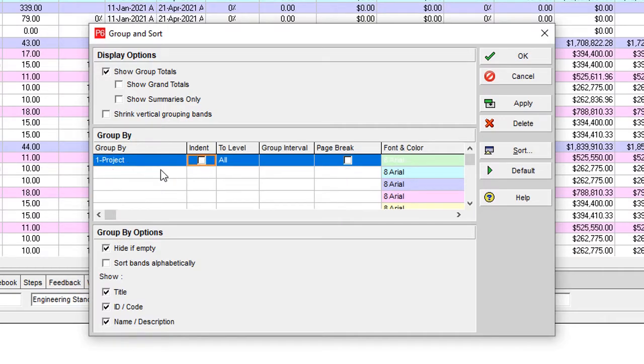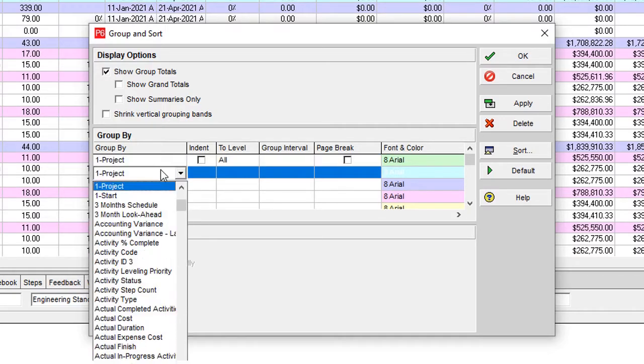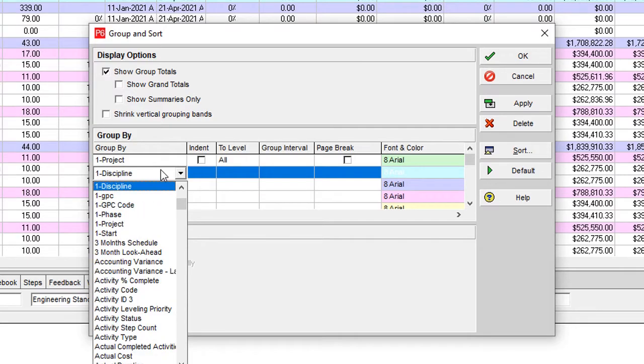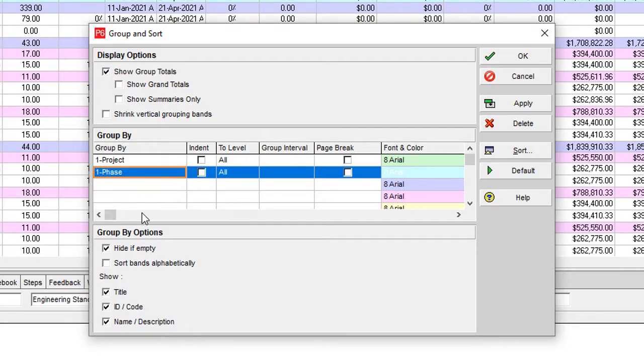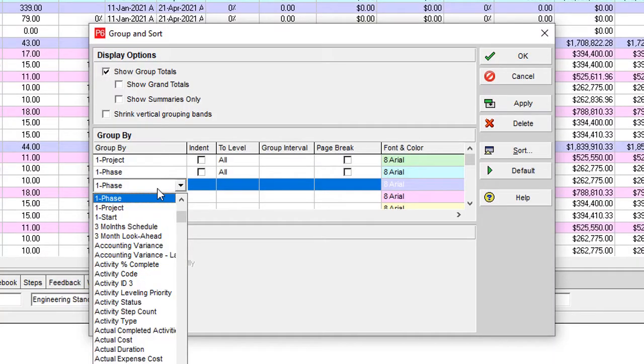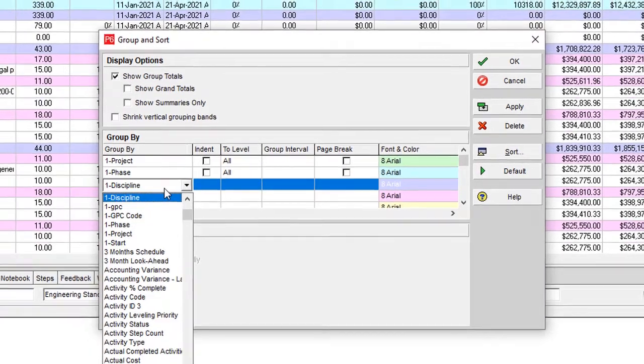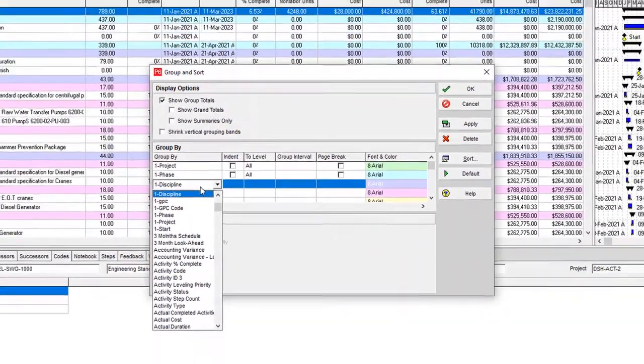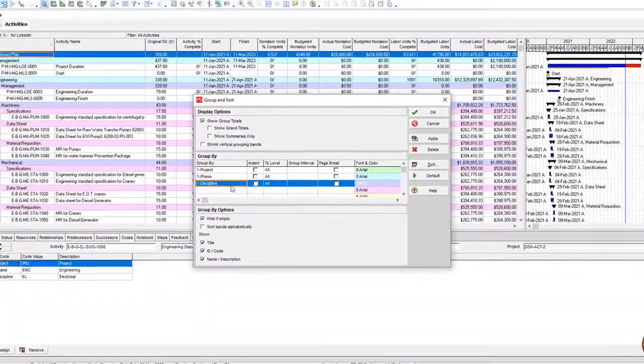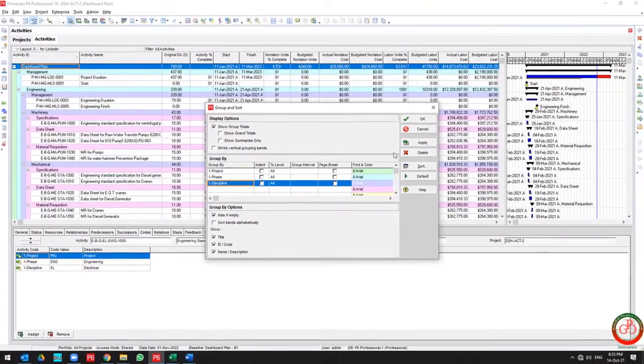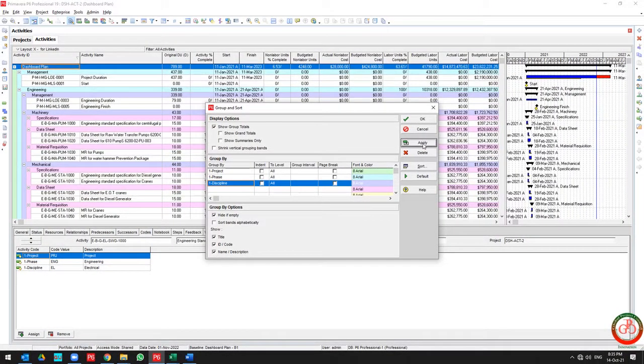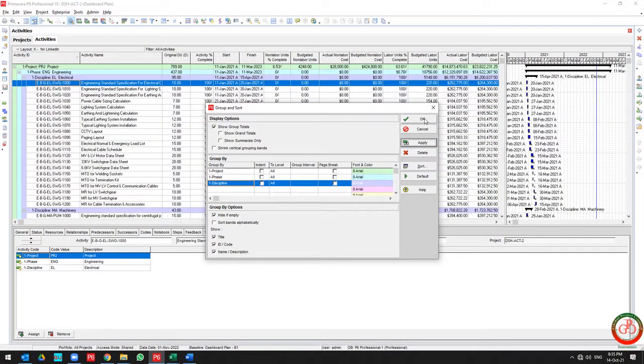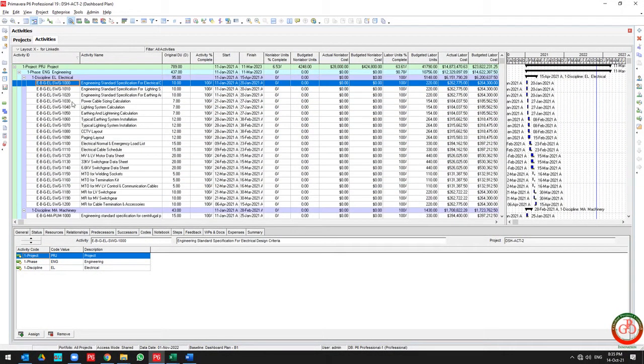The first level of activity code in the project is the project level. The second level is the phase, and the third level is discipline. By using these three levels of distribution of information...